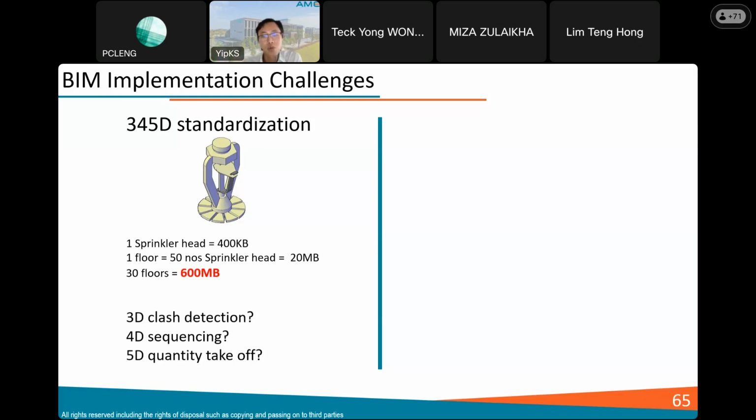Yes, we may need to model in the sprinkler, but we do not require such detailed geometry. Easily take measurements of sprinklers by number only. Whether the sprinkler is nice looking or not nice looking, or even you draw a small cube to represent the sprinkler, and then you name it a sprinkler, also no issue at all.